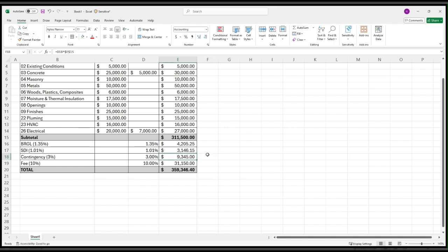Now, if you're working with specific owners, some of them will only let you spend that money if an issue arises. Others may not care and they'll just give you a lump sum, whether you use it or not. You get to keep it. In the first scenario, the money would just stay with the owner unless they allocated it to you. So there we go.